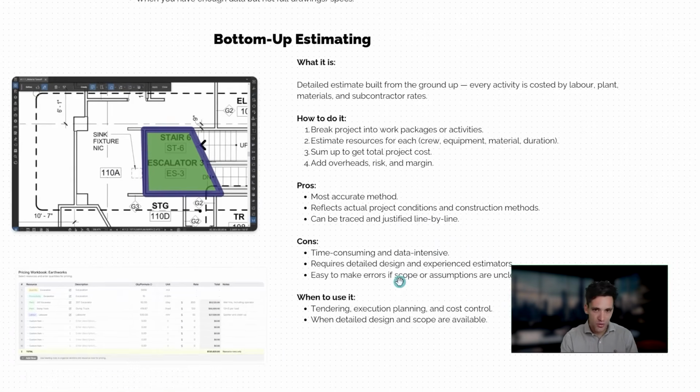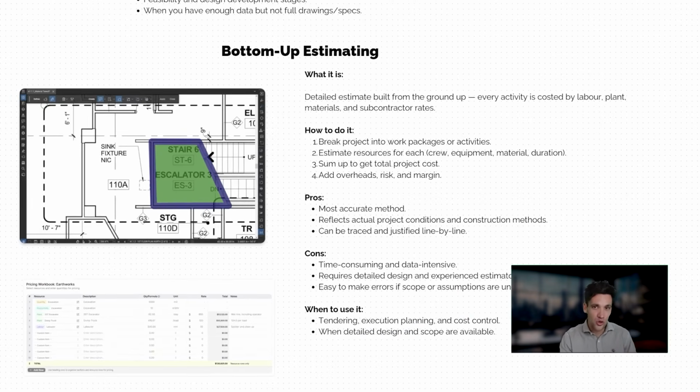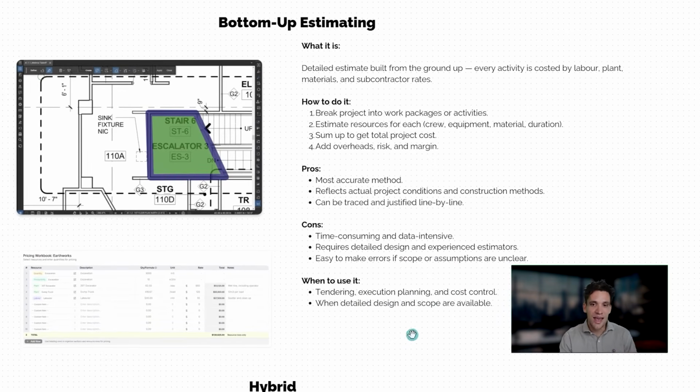Now, the cons of a bottom-up estimate is that it's obviously time-consuming and data-intensive. It requires detailed design and experienced estimators, and it's easy to make errors if scope or assumptions are unclear. So you use this method when you're tendering, planning execution, and also for cost control during the project when you have detailed design and scope available.